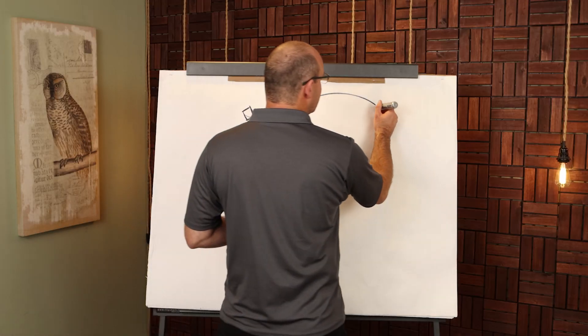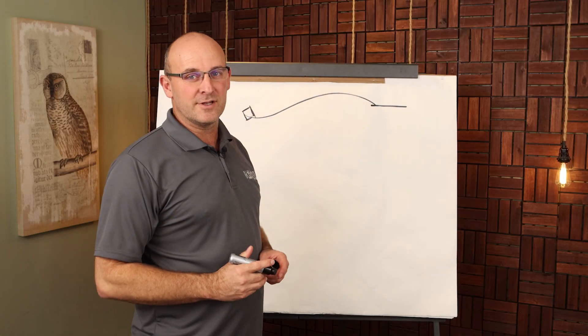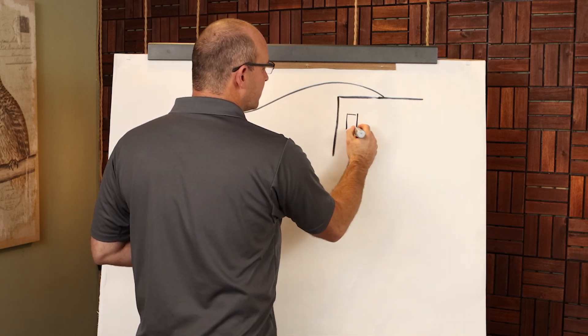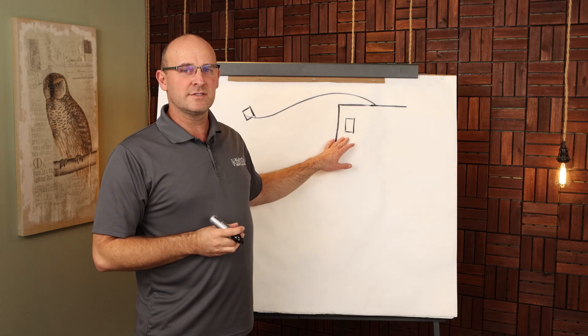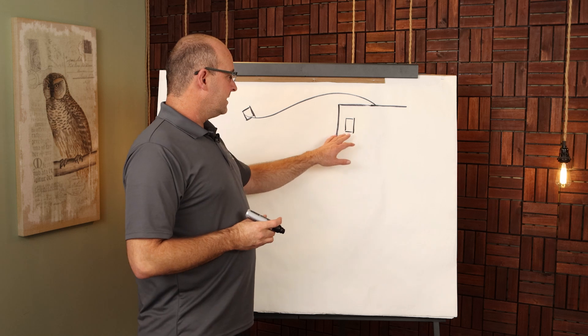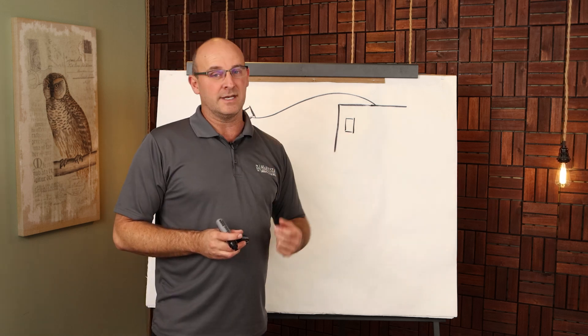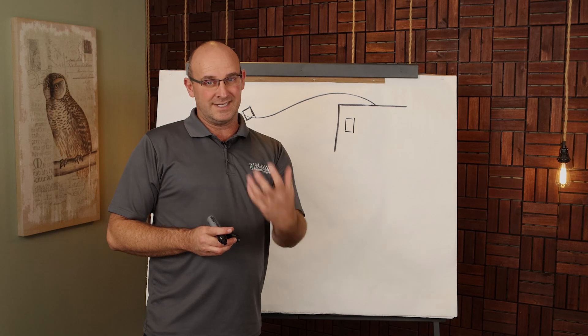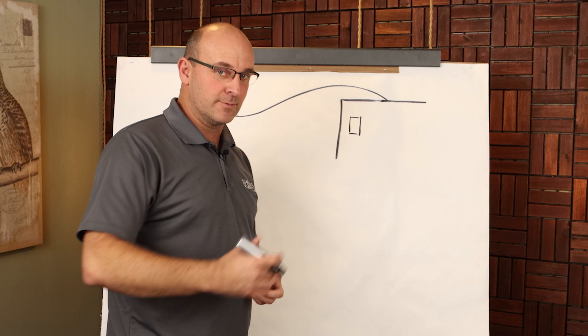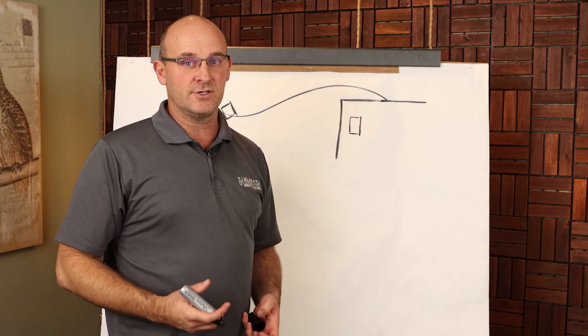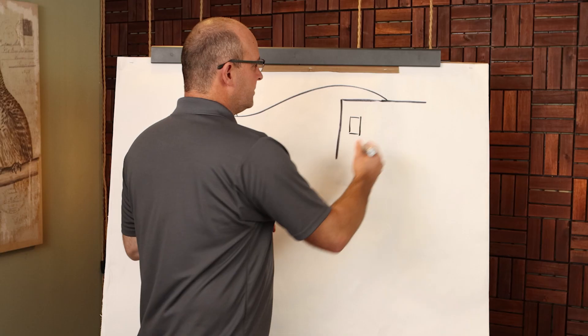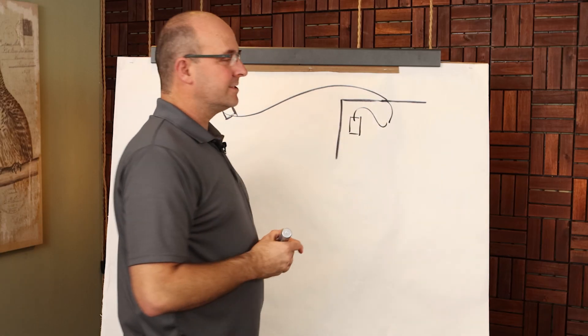When you enter the job site, now this is where the fun begins. One of the things that I love about field engineering is that when you're on site you're able to interact with the project management team. You will have an office and you will be typically in the field engineer bullpen in an open office space. This is where you will do two different kinds of planning: the crew or the FE group or team huddle, which is where you talk about the group tasks for the day and anything that's coming up. Do you need to request the professional surveyors, do you need to call an inspection, do you need to get ready for a placement, is there coverage that you need for the day? Once you come in and park you're going to go into the trailer and do your team planning.